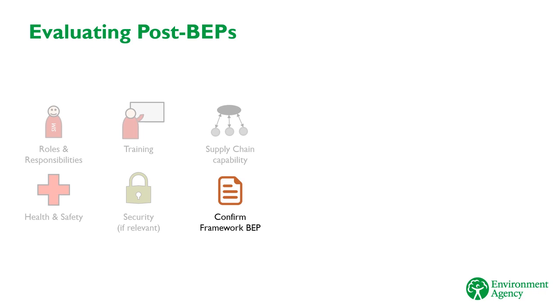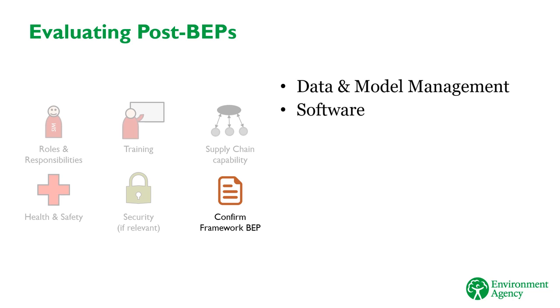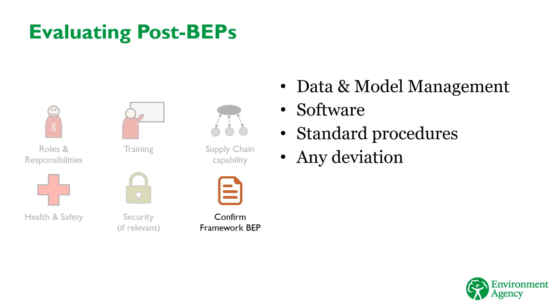This includes information about model management methodologies, software to be used, including the supplier CDE, and other standard procedures for implementing BIM. If there's any deviation from the framework BEP, then this needs to be thoroughly explained so that we can have confidence that the supplier's proposed way of working doesn't cause problems for us receiving data and information.